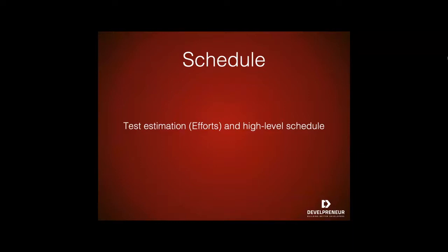At this point, all relevant milestones should be identified with their relationship to the development process identified. This will also help in identifying and tracking potential slippage in the schedule caused by the test process. It is always best to tie all test dates directly to the related development activity dates. This prevents the test team from being perceived as a cause of delay.